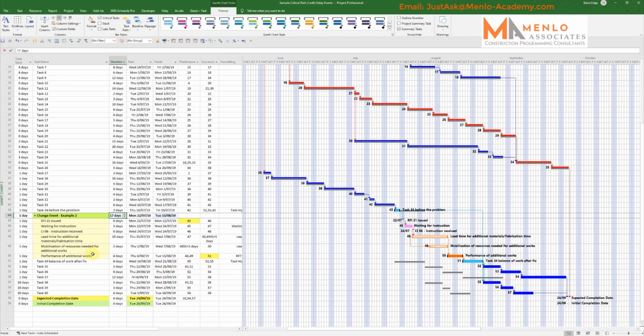Originally we had 18 days, and now it's taking up 17 days, which leaves 1 day difference between the amount of slack that was in, and so we have 1 day left of slack in this job. Now this makes this chain of work very close to critical path, and on any other delays on these works, if they don't happen in exactly this chain of relationships, if a job takes a bit longer or doesn't start, it will affect critical path and start pushing out.